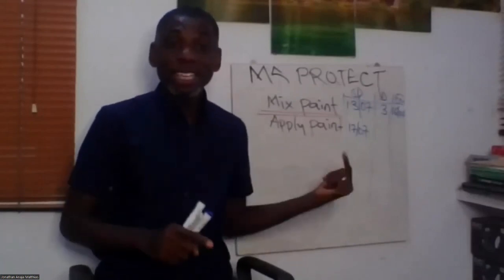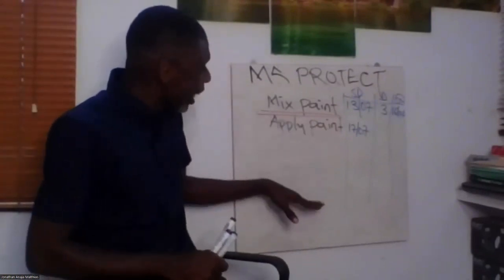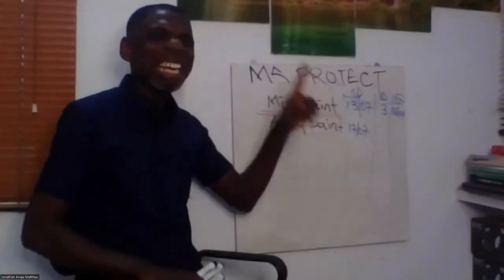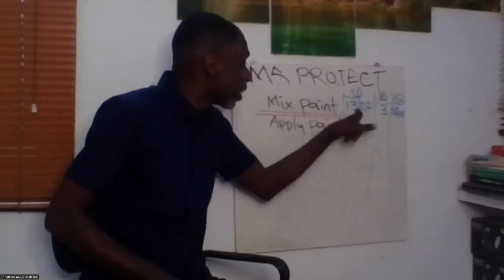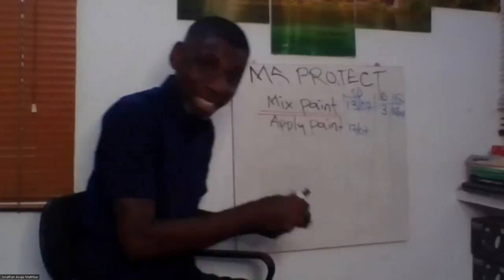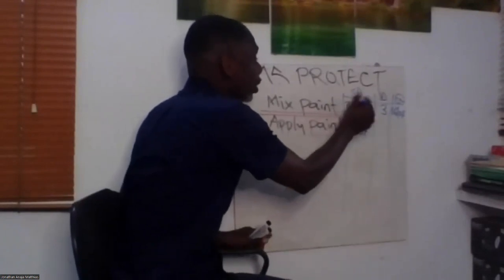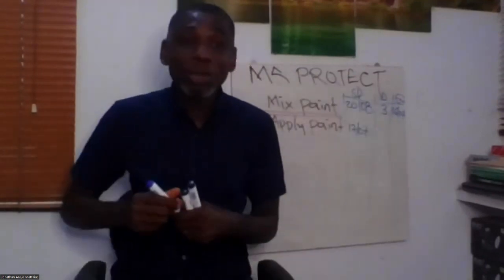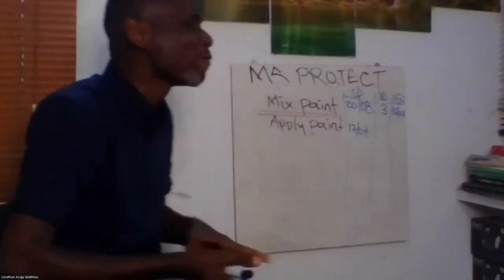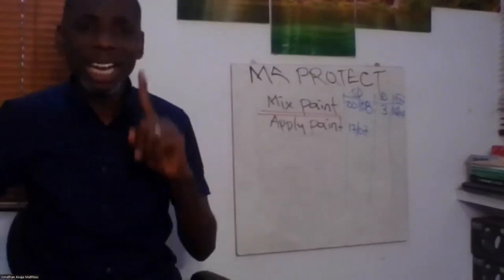You know the advantage of linking. The advantage of linking is that you will not need to go back and do your MS Project all over again. Because every successor activity is linked to its predecessor activity, immediately you change only one thing, for example, the project is now starting on the 20th of August, all I need to do is change my predecessor to the 20th of August, and every other successor activity, it schedules for me automatically.